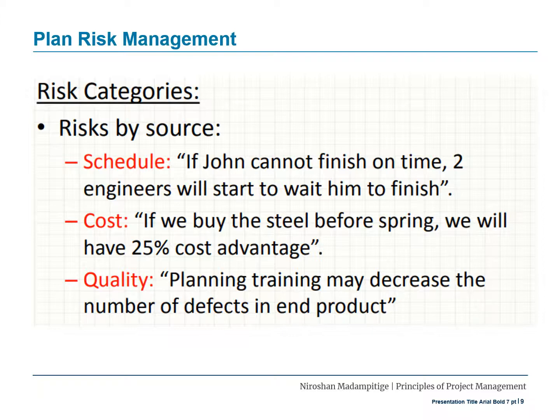For cost-related risks, an example would be: if you buy steel before spring, you will have a 25 percent cost advantage. If you have a situation like that, it is a cost risk — a risk associated with the budget and costing. Quality risks are associated with the quality of the project or product. For example, product planning and training may decrease the number of defects in the end product. Another example: if your QA resources are occupied by another project, you don't have anyone to do quality assurance — that is a quality risk.